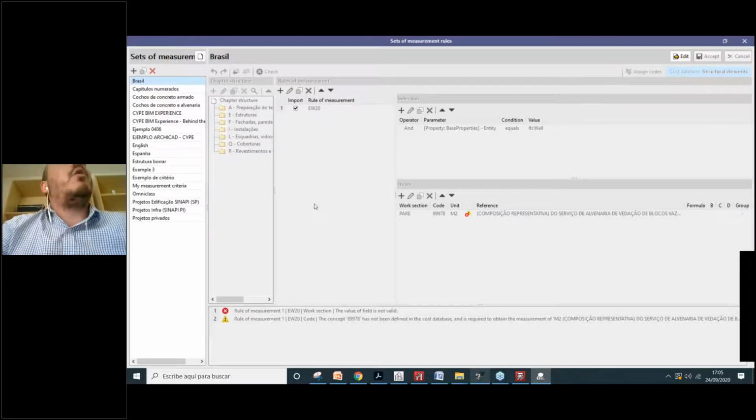You probably have the same codes, the same description, and when you have to update something, you change the price, maybe change some information, but always maintaining the same code. If both have a fixed criteria, when you create a correlation between them, this correlation can have a criteria too, and you can adopt the same criteria in all your projects.